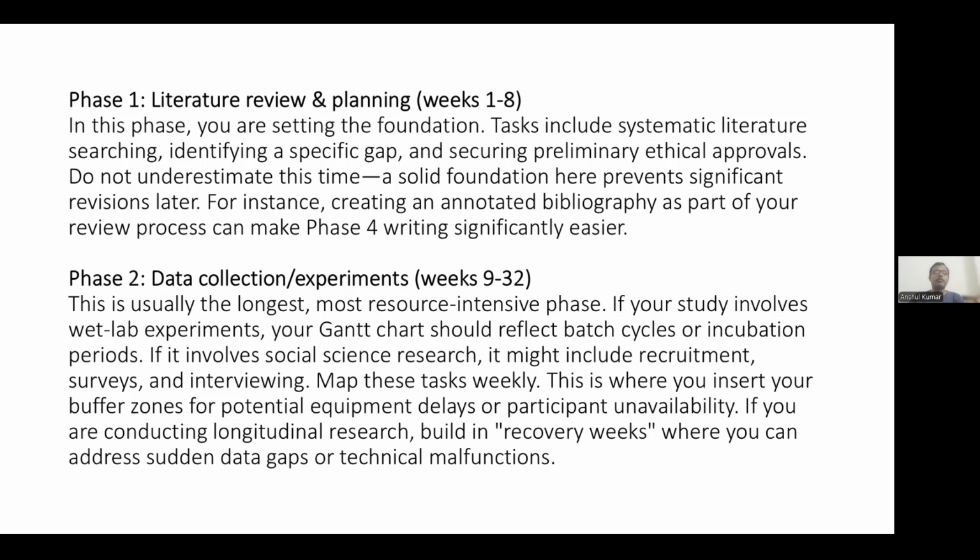your Gantt chart should reflect batch cycles or incubation periods. If it involves social science research, it might include recruitment, surveys, and interviews. Map this task weekly. This is where we insert our buffer zones for potential equipment delays or participant unavailability. If we are conducting longitudinal research, build in recovery weeks where we can address sudden data gaps or technical malfunctions.